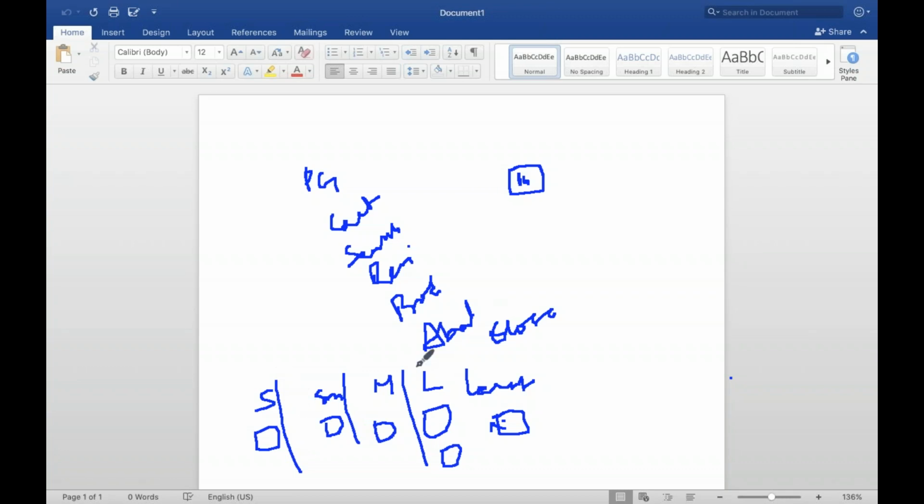This is one way of doing the estimation. They use t-shirt sizing also. T-shirt sizing also you have in the same manner, right? You have S, you have M, you have L, you have XL, XXL. Yeah, they may use that also. So grouping similar entities under the same category, this is called an affinity diagram. Affinity diagram is nothing but grouping similar entities under categories.